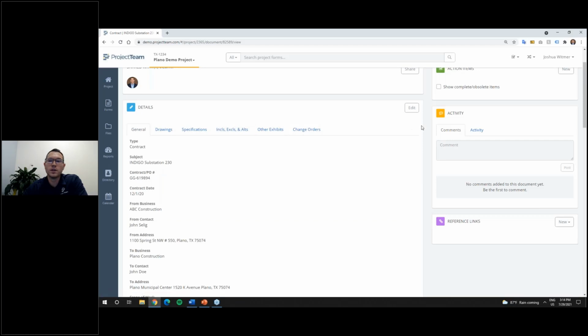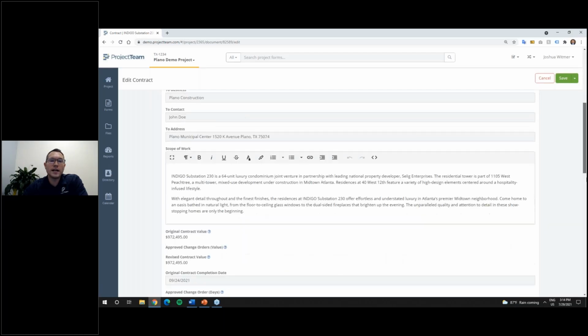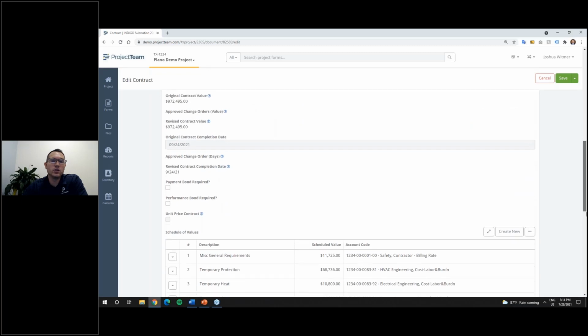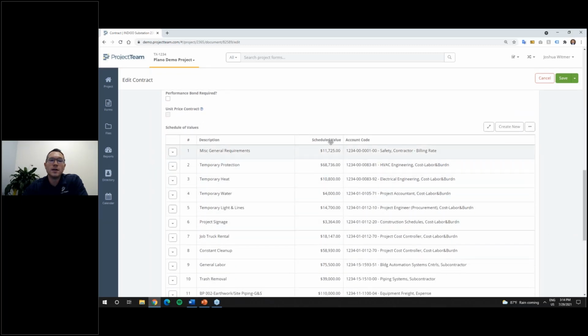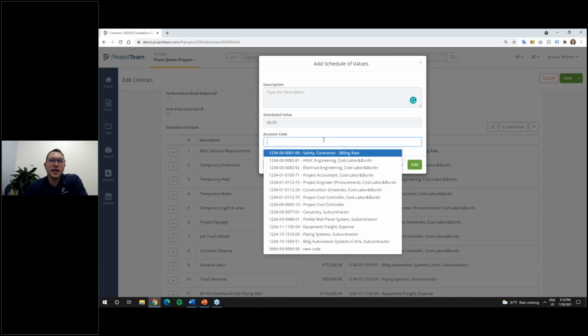All right. So before I go down through some of the other panels, I do want to just say, maybe I want to edit my contract. I can scroll through my contract. Again, we can set up as many fields or show the fields as we want here. But if I needed to add something to my schedule of values, I could go to the table here and just say add new. I could add a description, a value, and then link that to maybe my budget code or my account code as needed. That way it lines up in the right place in my budget reports.